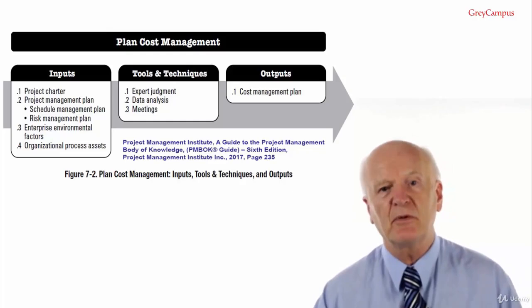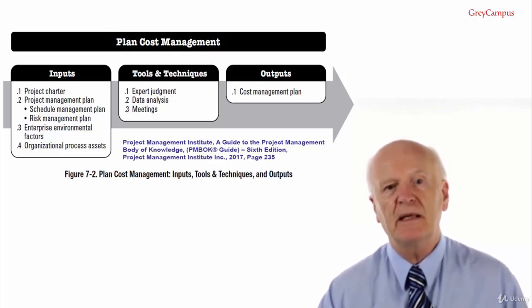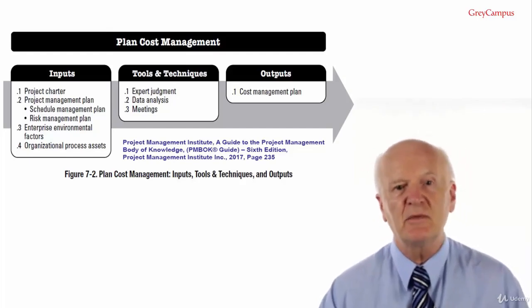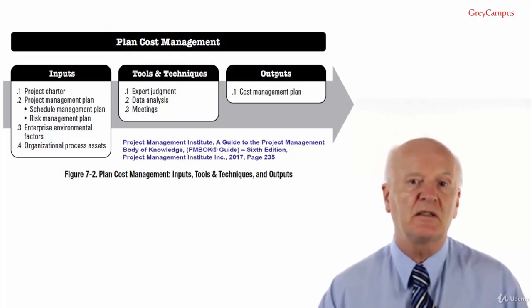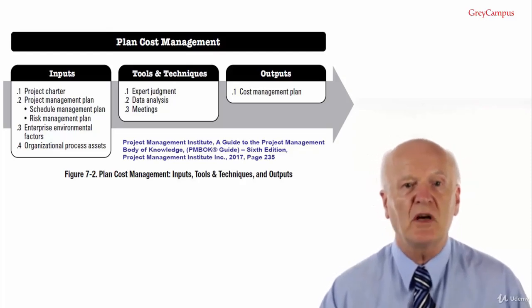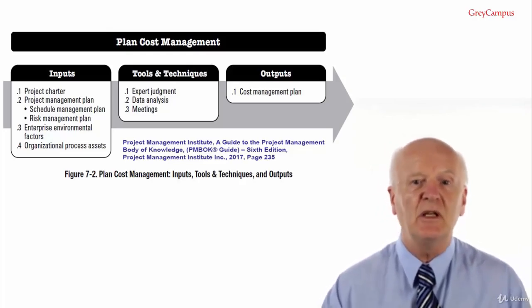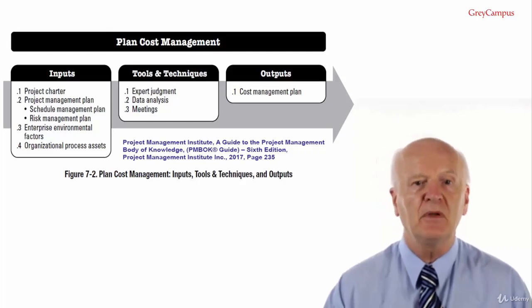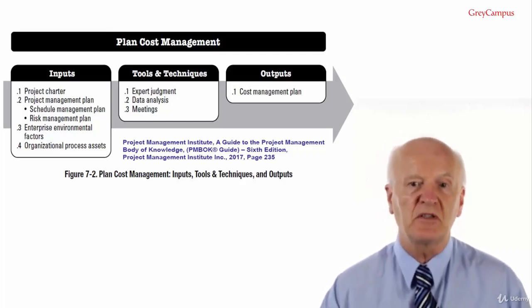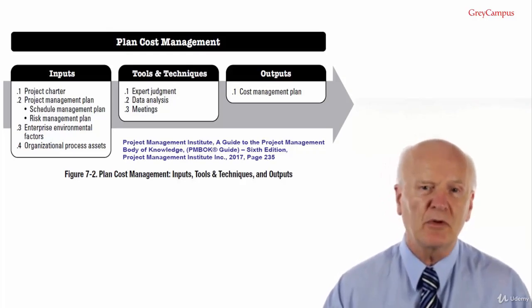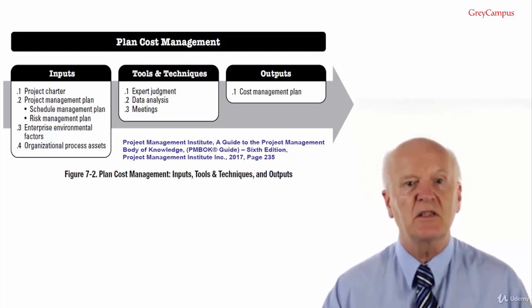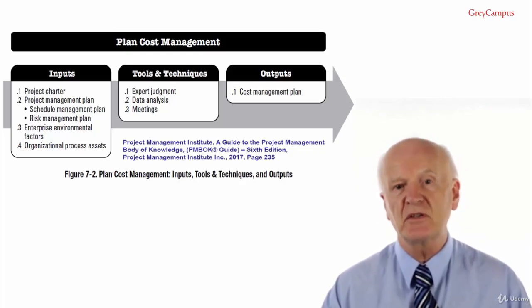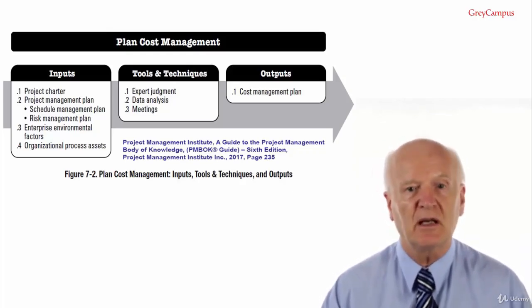The work breakdown structure provides a framework for the cost management plan, allowing for consistency with the estimates, budgets and control of costs. The work breakdown structure levels used for the project cost accounting are the control accounts, which are the main deliverables. Each control account is assigned a unique code or account number that links directly to the performing organisation's accounting system. Hopefully you will recall that the numbering system on the work breakdown structure is called the code of accounts, and the numbering system in the organisation's accounting system is called the chart of accounts.